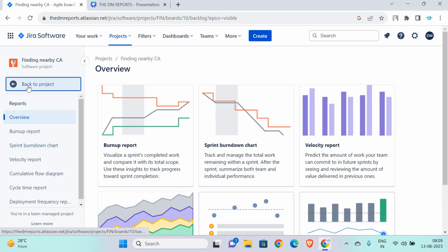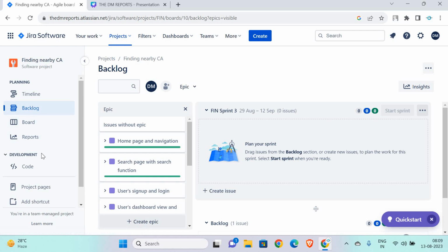But in an actual scenario, these burn down charts will show the progress of a project. Vertically you will be able to see, inside the sprint, how much you have achieved, how much you are spending, and how much extra change management has been accepted, like the client has asked to add certain more features in that sprint itself, which might affect the deadline of that sprint.